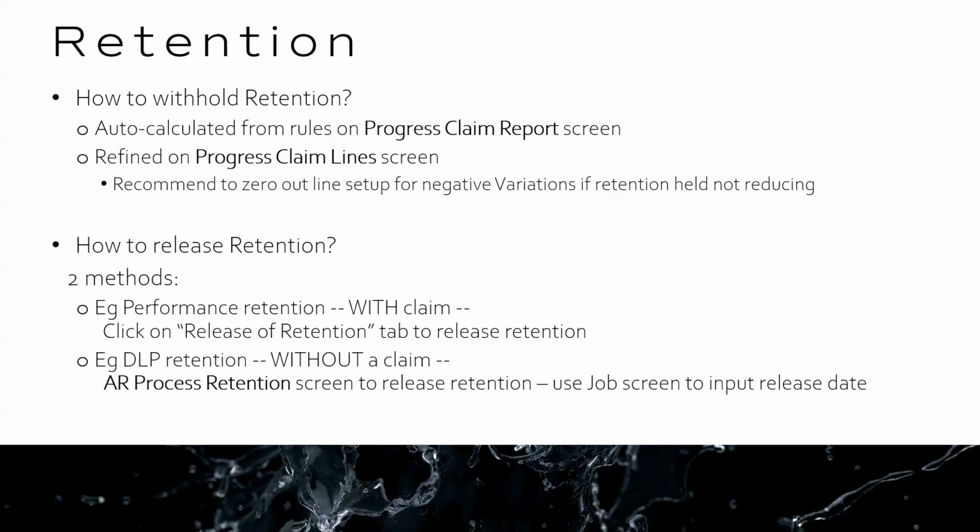Let's say, for example, you now need to actually request that retention from your client. Contract's finished, need to request retention. There's two ways of doing it. The first way is that it's done within an actual claim. So this is probably, for progress claims, our preferred method, because what that'll mean is that you'll actually come